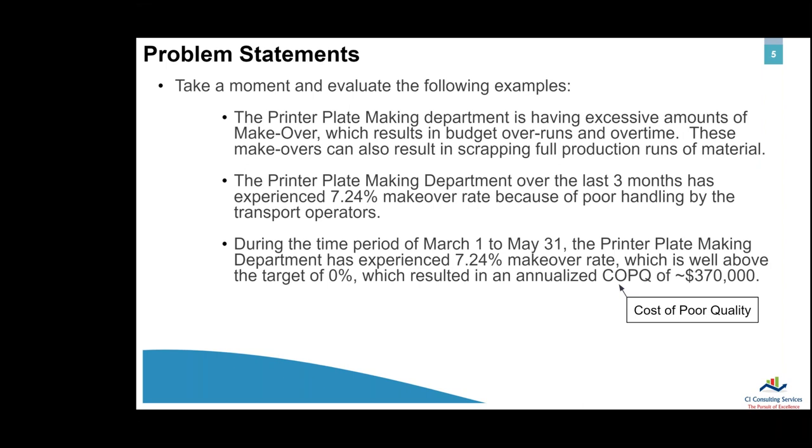Now, moving on to the second problem statement, the printer plate making department over the last 3 months has experienced a 7.24% makeover rate because of poor handling by the material handlers. So this problem statement is marginally better. It's really not that good. It certainly wouldn't run with it. For one, which last 3 months are we talking about? Also, it points the finger at the material handlers, which is presupposing a lot of things that we don't know, or else we wouldn't be doing a project.